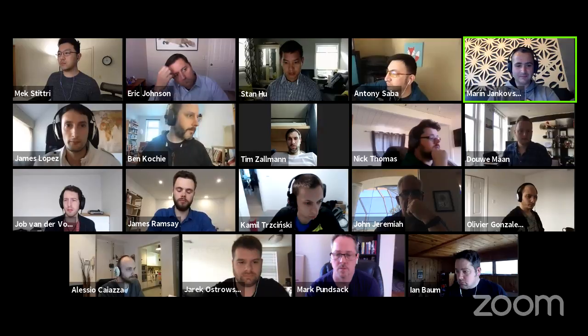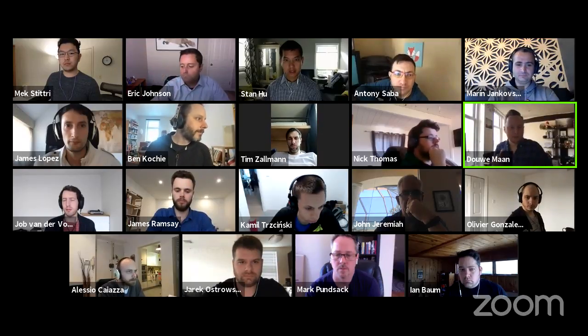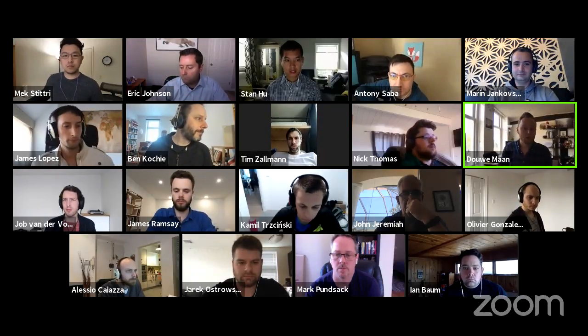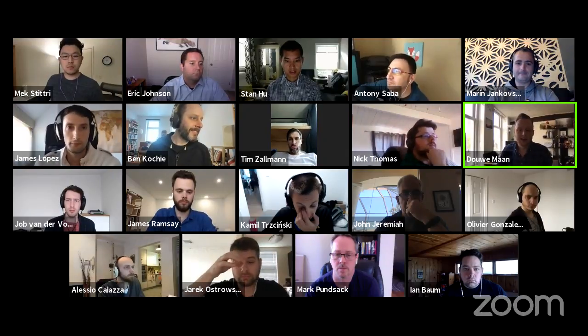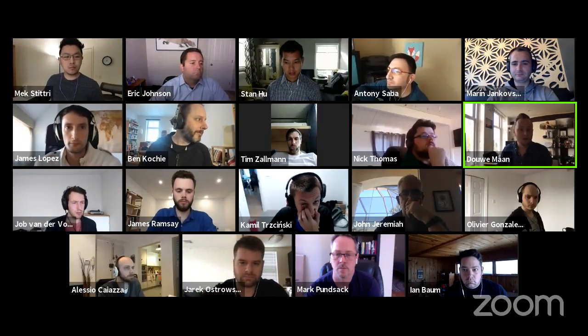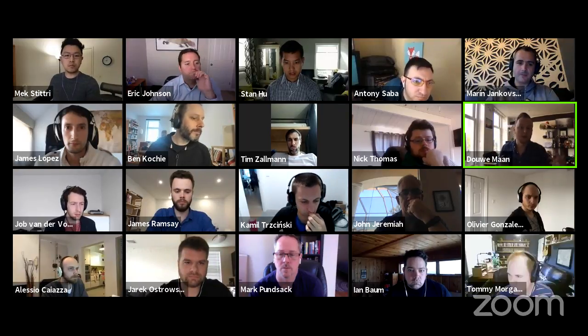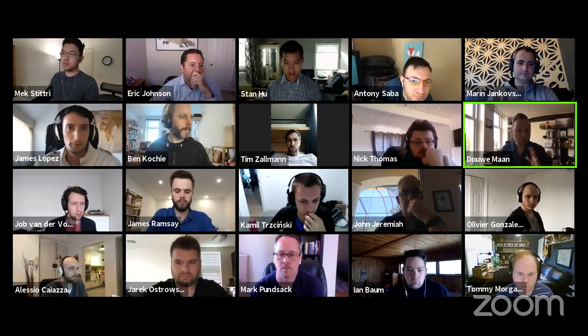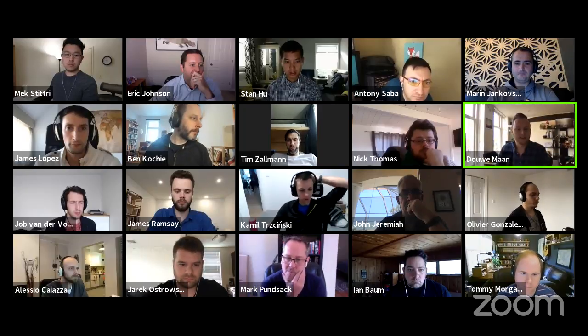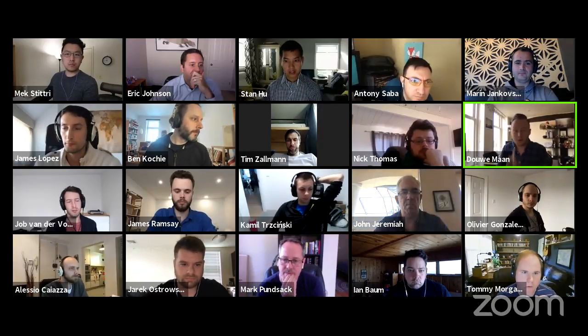Dawa, you're up next. Yeah, thanks, Maren. There's some more detail in the document, and I'm going to keep this short because I know I have a lot to retrospect on today. But one thing that went very well over the last 4 months is that we had a substantial set of functionality that we promised to a customer. And by splitting it up, spreading it over those 4 months, we actually managed to get all of it in before the 10.7 freeze, with one small exception.